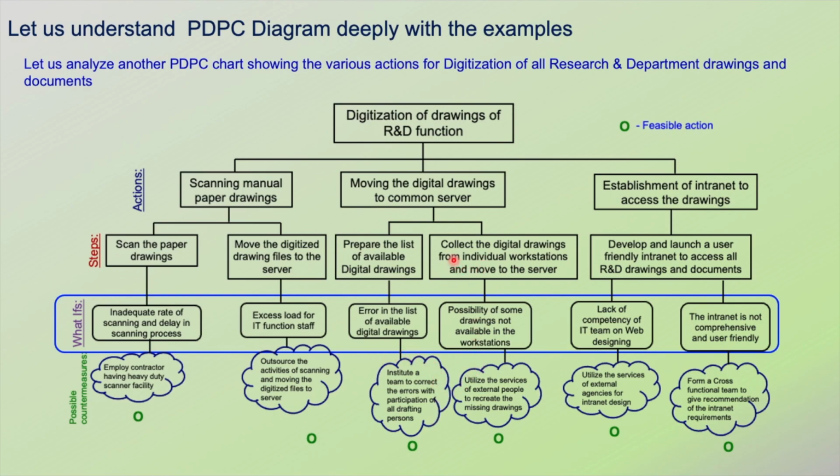Similarly, for collecting the digital drawings from individual workstations and moving to the server, what could be the possible failure? Possibility of some drawings not available in the workstations. So what could be the possible countermeasure? Utilize the services of external people to recreate the missing drawings.